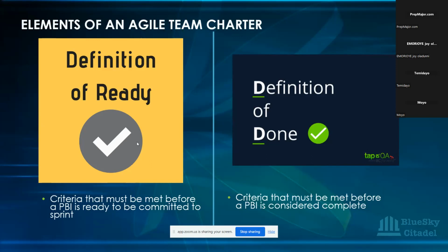And then the definition of done could be that the acceptance criteria and the criteria tests have been fulfilled. The developers have actually developed the features, unit testing has been done, it has been integrated with the other increment and it is working. You could also put more points, like products have been tested, regression testing has been done and there are no showstopper bugs, and the features are ready to be tested by the users. So the features are also shippable and can be demonstrated to the customers.